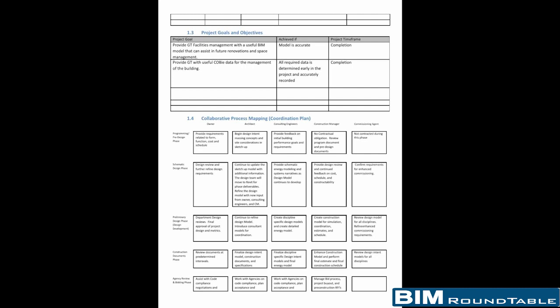We have multiple sections, one for construction, architecture, and owner. Yes, all specifically called out differently because there are different goals, and something that I might want as a contractor might affect design a lot. They may have to model quite a different way than they're used to to make it so that I can meet my goal, and they need to know that. So we supply all those goals from all the parties. Oh yeah, that's true.